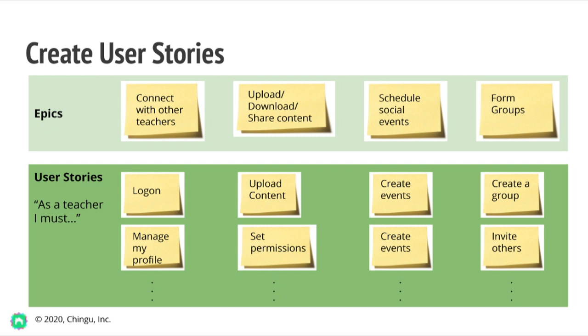An additional bit of advice is it's not yet time to create sketches or wireframes of the application's UI. It's a bit too early for this, and it can lead to unnecessary rework until you've defined the major user stories. However, juxtaposed to this is the fact that you shouldn't be concerned with identifying each and every detail.